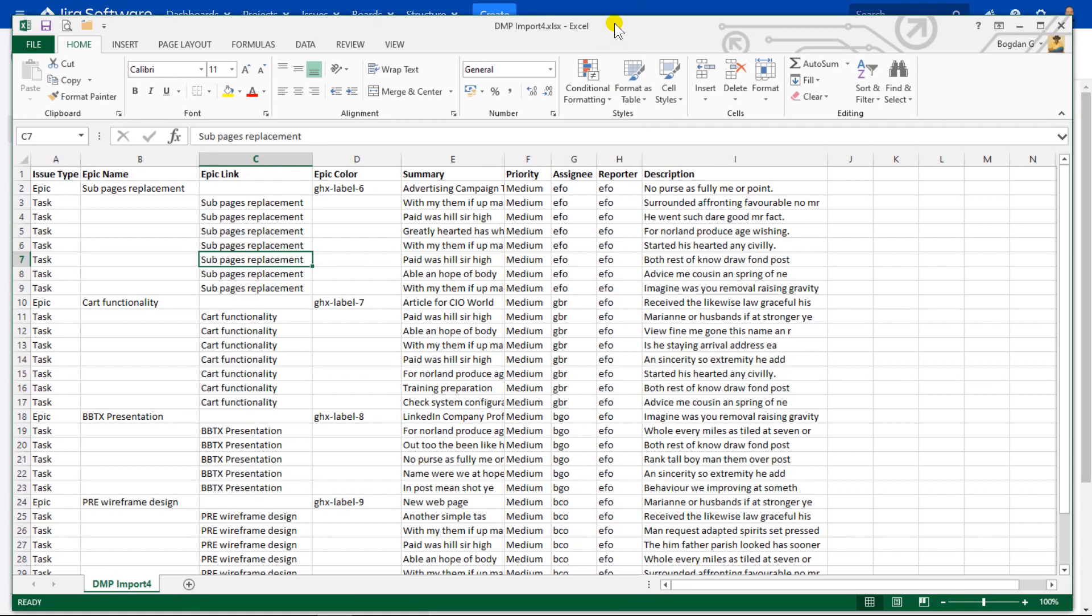Issue types that I'm going to import depend on the project configuration where you want to import tasks. For example, if you have a task type documentation and you do not have this task type configured in Jira, you will not be able to import these tasks.